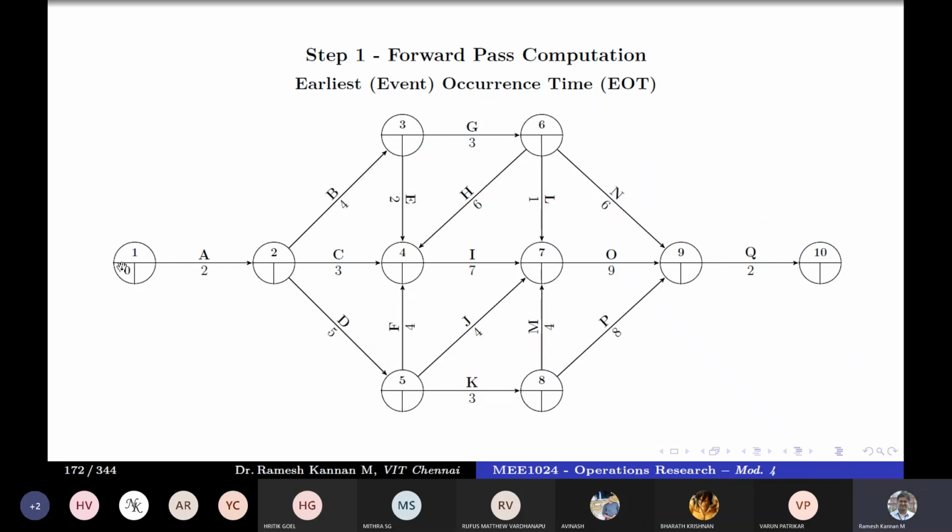All right. So events 1, 2, 3, 6, 4, 7 until 10, right? So it's activities, and beneath is the duration part. So EI, earliest, how early event 1 can start, is 0, which means it can start instantaneously. Or in other words, all the start events will have 0 as the earliest event. So remember that, right? Which means that it starts instantaneously.